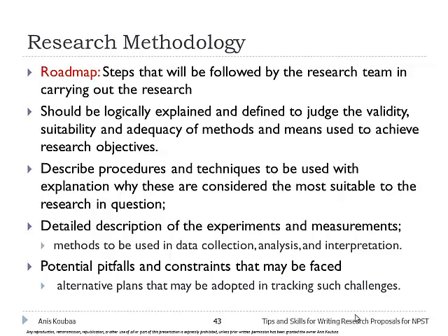And it's not bad also to discuss some potential pitfalls and constraints that you may face in the project and provide alternative plans. So you may anticipate the reviewer's questions. If there are possible problems that may be faced in the project, it's also possible to discuss them. Maybe you say, in some cases, maybe we cannot acquire the technology. You plan to have, for example, expensive equipment, but you may say, if we don't receive this equipment, we may use simulation, for example, and you give another plan for the execution of the project. This is also possible.